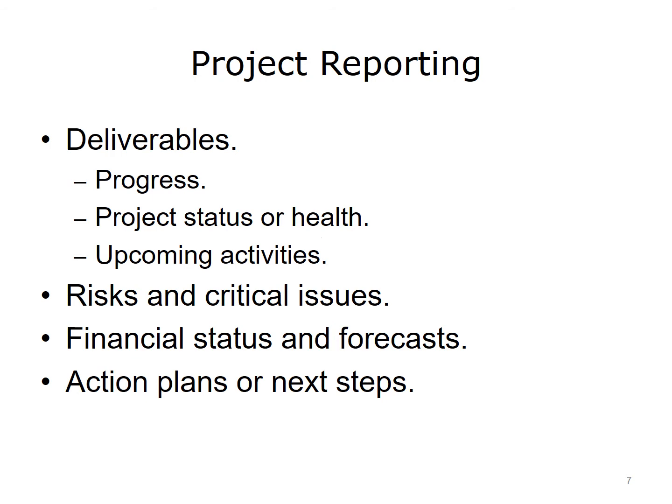As part of your monitoring duties, you will probably have to provide a regular project report to your customer. This report should include the progress, status, and upcoming activities for your deliverables, detail risks and critical issues, provide updated financial information, and recommend action plans or next steps.